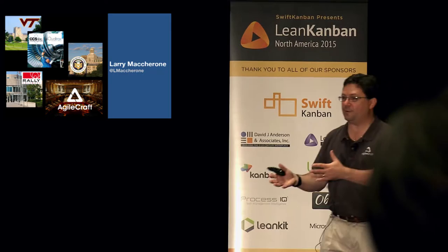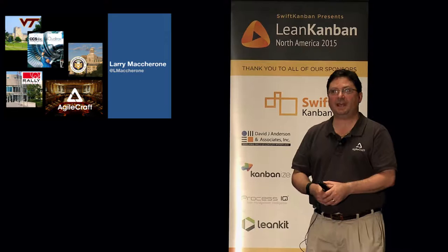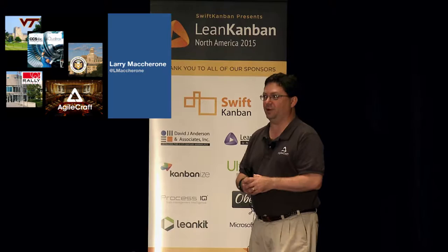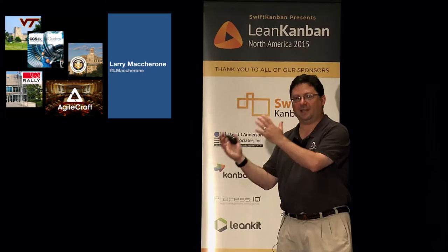Some of it confirms what we know, or what we thought we knew. Lowering your WIP is great, but some of it goes against what we thought we knew. So there are findings on co-location that are a little surprising to some folks. If you're not completely co-located, you can actually outperform fully co-located teams as long as you're within the same time zone, for some reason. And I have theories on why in that other talk.